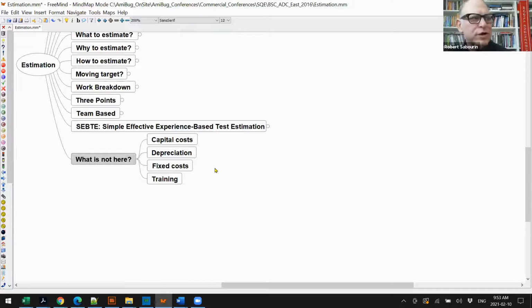And frankly, I've worked with testers, even experienced testers with lots of experience, and they dramatically have different ways to test, different choices. And it's so different that it does affect the estimation. And so the estimation approach really demands that if you have a team change, that you recalibrate by just restarting to collect data. And while I do that, I like to keep, as I said, about 3 sprints. I will use the old data, so it's still useful, don't throw it out, but I'm going to start collecting new data right away with the new team. So that's the recalibration.